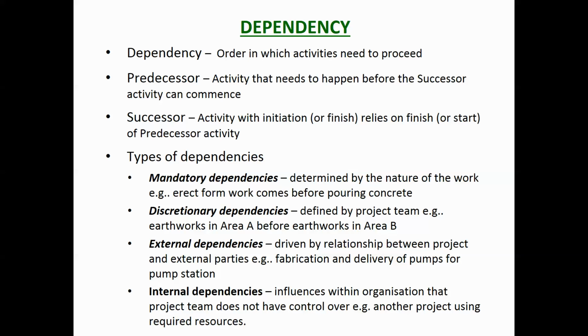It's very rare for you to have unlimited resources, and you need to work in with other projects within your organisation, other projects within Auckland. So for example, there's only about 3 or 4 heavy lift cranes in Auckland. So if you want to do some heavy lifting, you need to book them a long time in advance, and you might need to schedule your work to work around when that crane is going to become available. So it's not just internal dependencies, it's external as well.